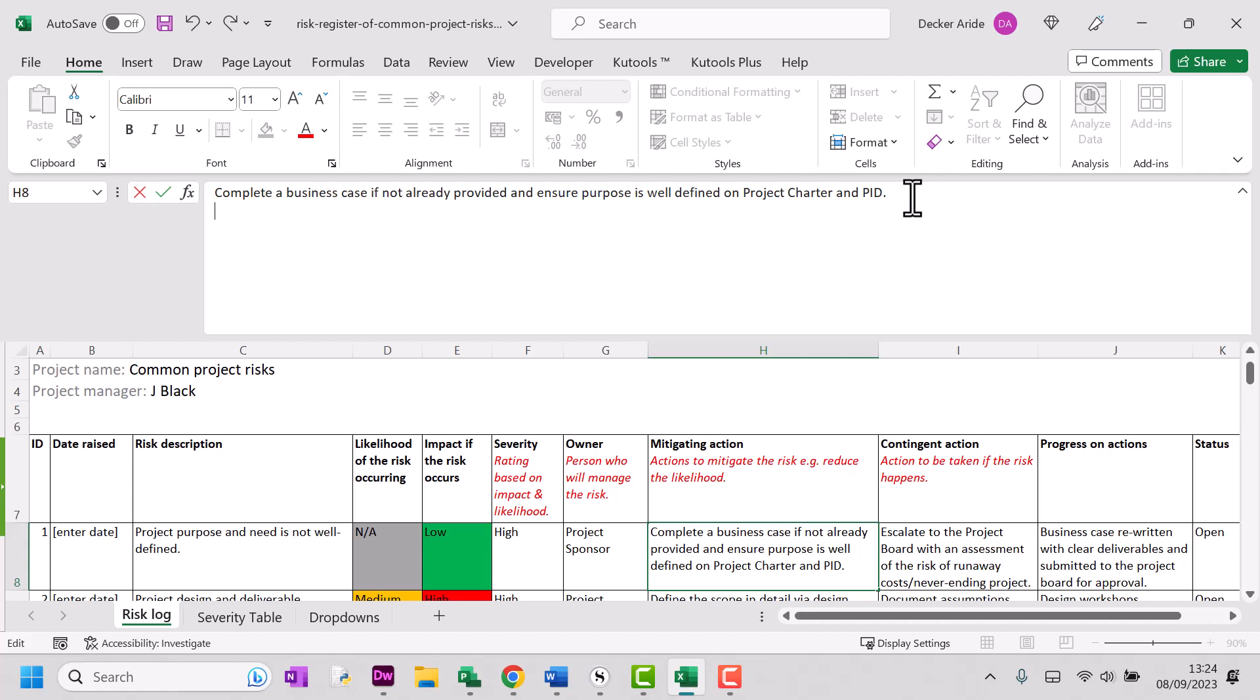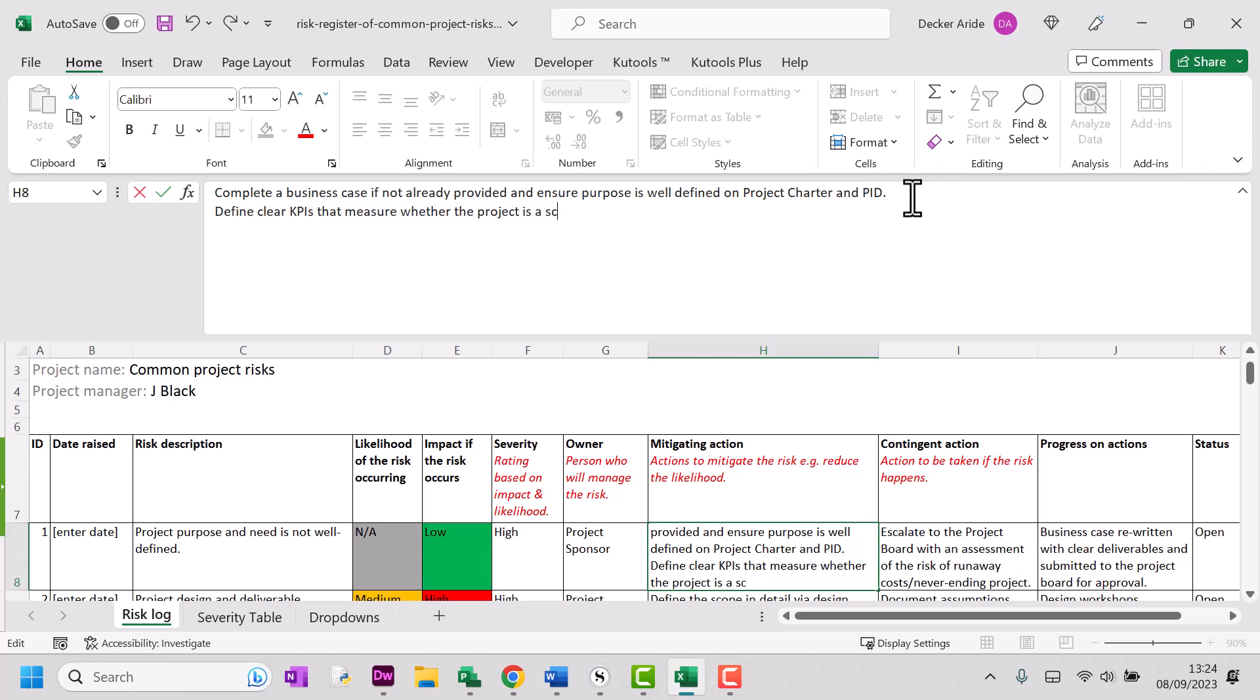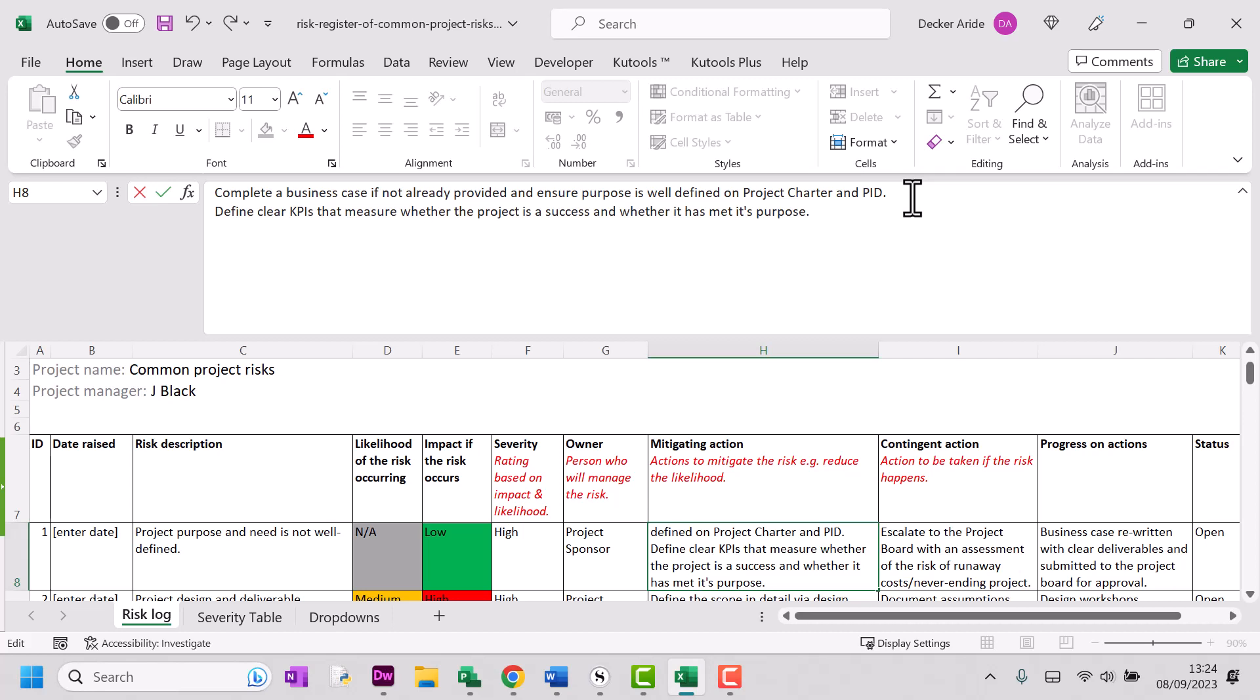And I'm going to say define clear KPIs that measure whether the project is a success and whether it has met its purpose. This is quite a good mitigating action to have to treat this risk because it's very, very difficult to define key performance indicators if you don't have your project purpose and need well defined.